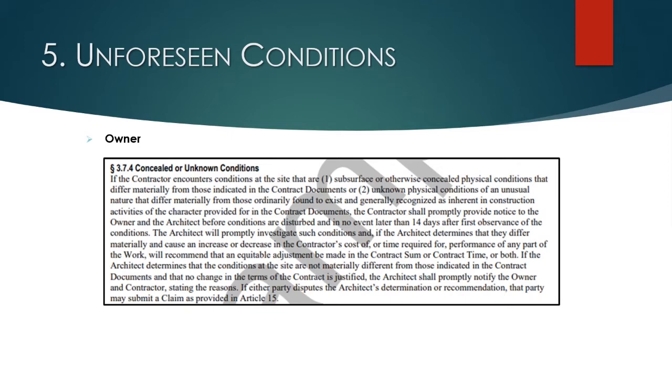You want to make sure that you look at those things because depending on what the contract language says, if you didn't look at those things and there's an argument that if you would have, you wouldn't have encountered or had this problem on the site, there could be an issue that those unforeseen conditions are not compensable and you're not entitled to additional time for dealing with them.